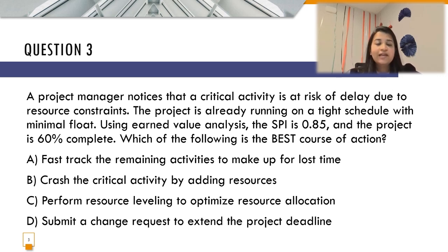Now, given the EVM values over here with an SPI, which is Schedule Performance Index, which should typically be greater than 1, making sure that the project is ahead of the given or the planned schedule. So here the value is 0.85. That means the project is significantly behind the schedule. Typically, we can say that it's 85% of the planned rate that we can discuss over here.